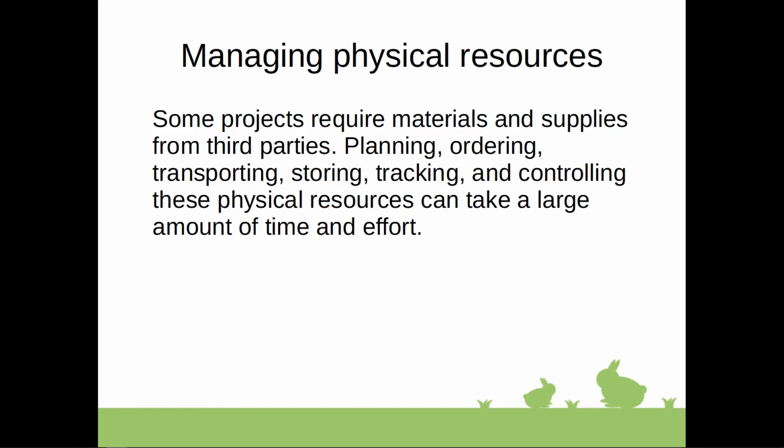So the objectives from the perspective of physical resource management are to reduce or eliminate material handling and storage on site of such resources, eliminate wait times for the materials, minimize waste, and facilitate safe work. And this is more relevant to non-IT environments, let's say, even though sometimes IT is engaged with physical resources such as infrastructure components like servers and whatnot.